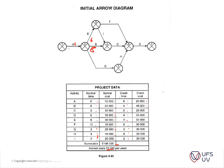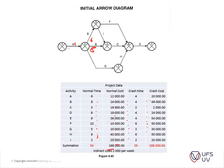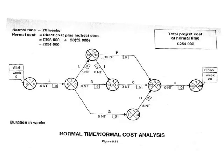The crash times and crash costs are also given in the table. To decrease activity A to four days, it will cost you twenty thousand extra pounds. Similarly, for B, to reduce it by four weeks it will cost forty-eight pounds extra. You can't just add all of these together because you won't get the right answer.